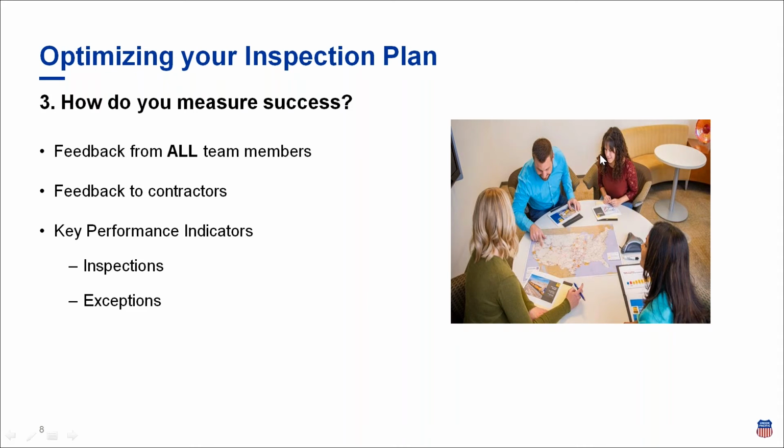Getting feedback to the contractors. In our standard work, we've built in quarterly feedback for all of our contractor firms. And as part of this, making sure that you're giving and receiving that feedback with patience and grace, especially in today's time.